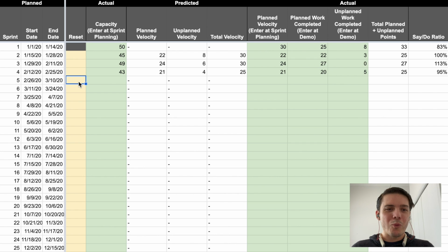We're going to want to reset our sprint velocity. Our tracking here is going to use new data going forward from this point. So let's say that we added somebody to our team and somebody's taking 3 days off. So that's 60 minus 3, right? So let's call it 57. But I'm beginning to think that this historical data isn't so useful anymore. So I'm going to put just any character here in this reset field. It's going to tell me it really doesn't know what planned velocity to use. So I can kind of take a look at it, say, okay, well, probably 29, but I'm not really sure.